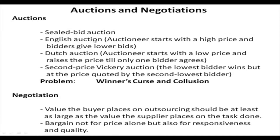In an English auction, the auctioneer starts with a high price and the bidder who gives the lowest bid is awarded the contract. In the Dutch auction, the auctioneer starts with a low price and raises it until one bidder agrees. In all these three auction types — particularly in the sealed bid auction — there is a problem known as the winner's curse, meaning the winner ultimately gives a bid higher than they could have.